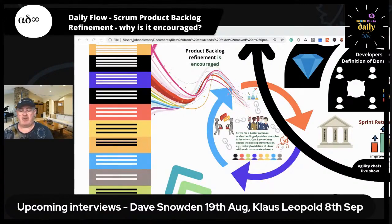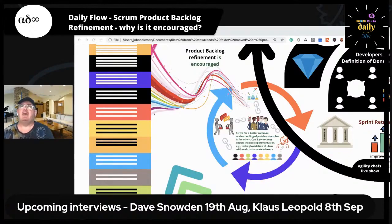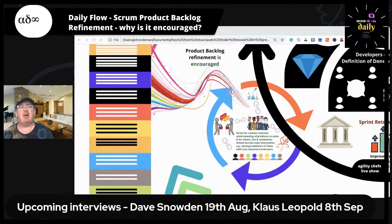They clarify the opportunity they're trying to avail of. This can lead to some problems because the product owner is ordering the backlog and may have said no to some items. When stakeholders come along and the developers are asked to clarify problems A, B, and C, but the customer wants to talk about X, Y, and Z — I would have trained developers to say, 'That's a really good idea, but you need to talk to the product owner. I'm here to clarify problems A, B, and C.' We really do want developers getting a common understanding of what problems we're trying to solve and what opportunities we're trying to avail of.